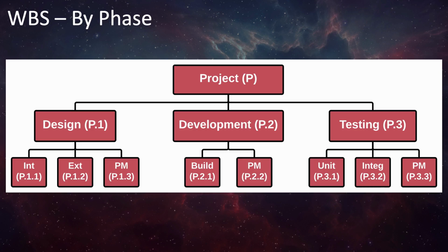Organizing your work breakdown structure by phase could be useful if you have some very long-lived phases in your project, or you have phases that are done by different organizations. Either way, organizing by phase is a valid way to put together a work breakdown structure.